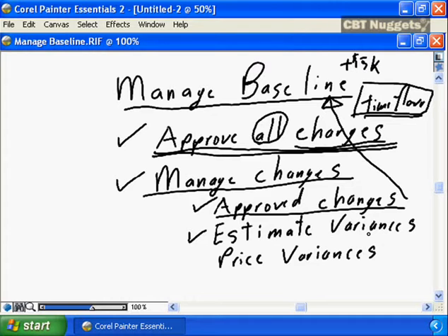Hopefully over the life of your project you will have some plus estimate variances where it's taken more time to deliver your project, and therefore more dollars. Hopefully you will have some minus estimate variances where you were overly pessimistic with the development of your estimate and it took less time, therefore less dollars, to deliver the project. There will be some give and take with the pluses and the minuses. You need to understand what the net of the pluses and minuses is going to be, and alert management, alert your sponsor, that there have been problems on my project as a result of bad estimates. And there's no shame in saying there were bad estimates. Remember what an estimate is?